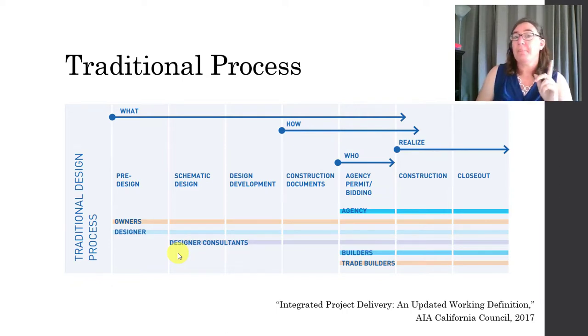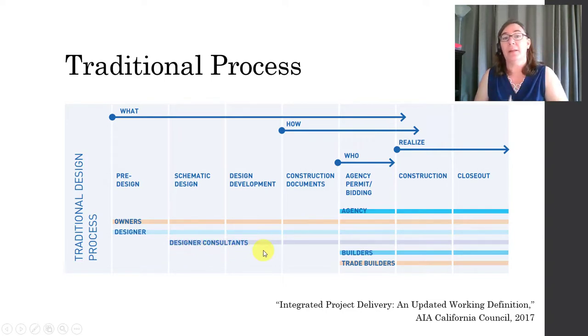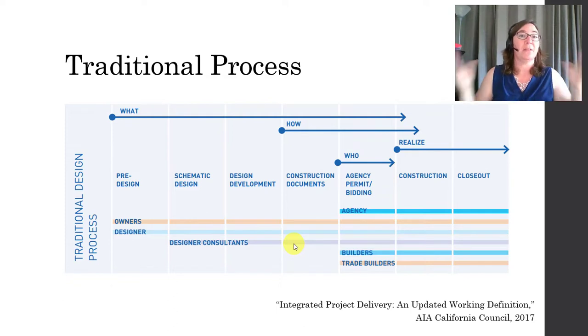They could be brought on board as early as schematic design, depending on their specialty, but often they are not brought on board until later in the design process. By the time you are in the construction document phase, all your consultants are on board.